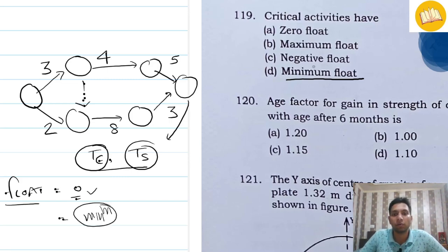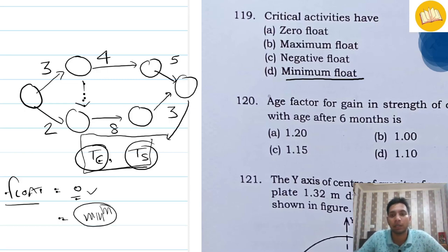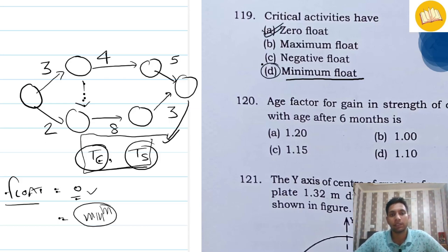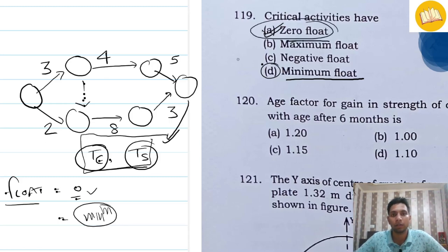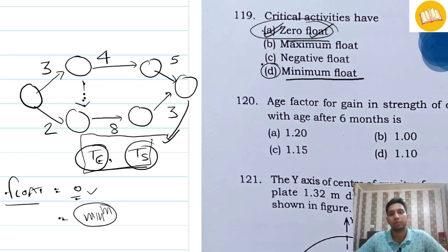Since in practice we assume expected time and scheduled completion time are the same, the correct answer should be 0 float, not minimum float. This can be verified in many previous year questions — in the IES exam also, this question was directly asked and the answer given is 0 float. So the correct answer here is 0 float, even though many books state minimum float.